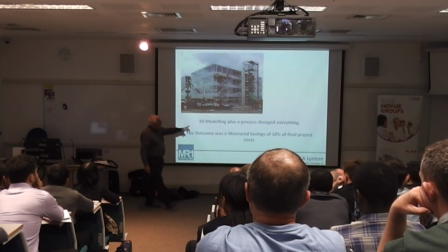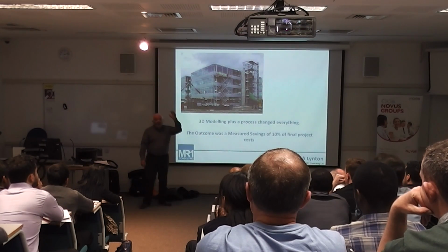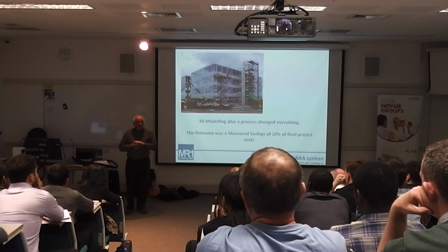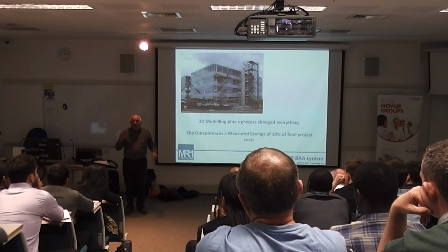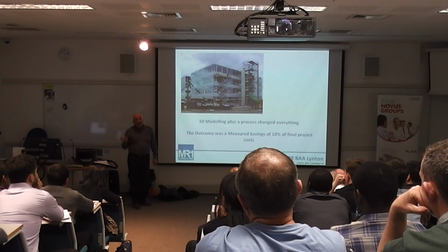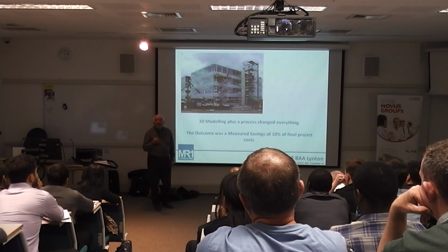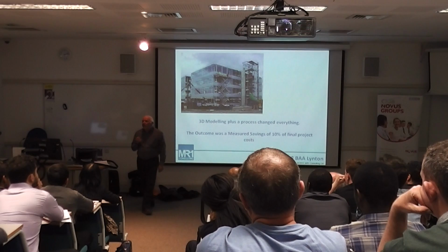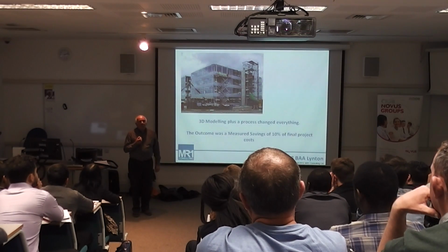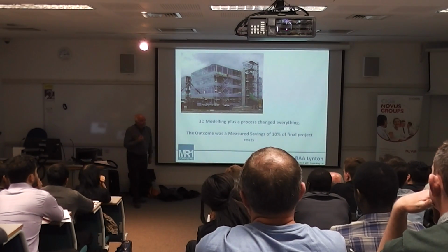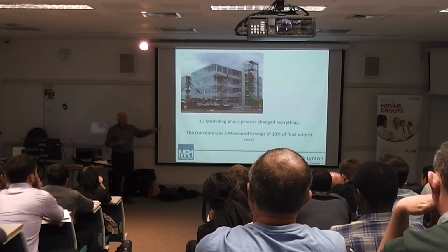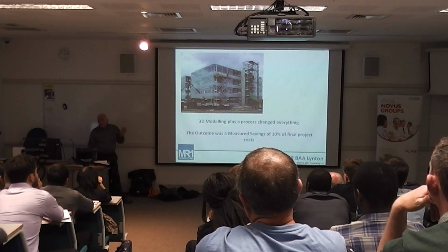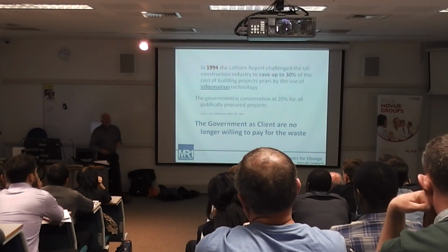We did the third building using the processes and methodology, and we reduced the cost of the building. We got rid of half of the waste. The fourth building, for whatever reason, which I never understand, was given to another team. The outcome of that was, without using the processes, the price went up again. The 25% waste came back into those projects. So process with the technology, with a collaborative attitude, will deliver better results.